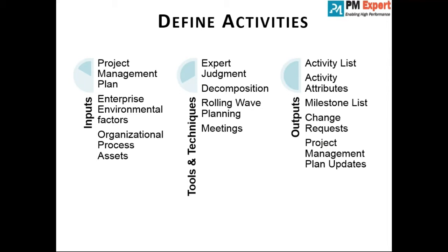So generally people put milestones only at sign-offs. My take on this is to try to put milestones at all the important points, or before and after all the critical activities. For example, this activity must start on this particular date can also be a milestone. The team must be on board by this date should also be a milestone. On this date, we should submit this activity to the customer for review can also be a milestone. And we all know phase boundaries like kill points and sign-offs are all milestones. So we can mark any specific points for that.